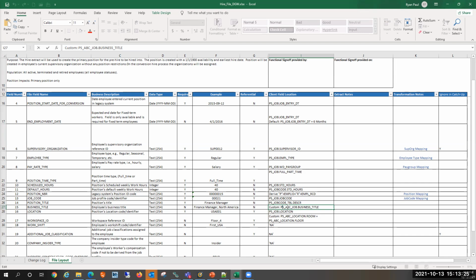Because then you can move roadblocks, get things pushed forward, and get those decisions made that need to be made about, are we keeping a customization, trying to work it, are we going to drop this, are we going to change a business process? And those things can be worked overall instead of just sitting. Because the reason you're not going to hit your timelines is usually that you don't have full buy-in somewhere in the organization, right? Or you come across something and you don't have all hands on deck.